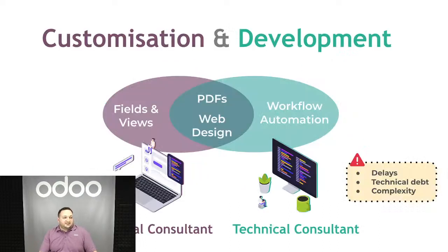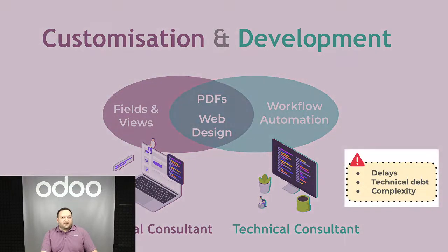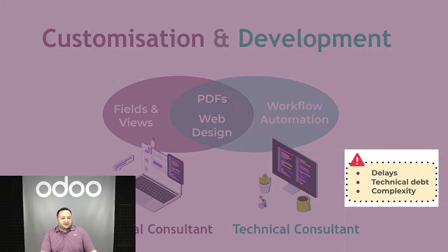So this is the difference between customization and development. Customization, as a consultant, I work with the fields, the views, the PDFs, the web design, and so on. Developers work on workflow automation and adding to the code. But what I want to focus on here is why we avoid and delay customization and development till the end: because they cause delays. They need more testing, so there's technical debt there. There's complexity. It just slows down the project, which is against our quick start methodology.